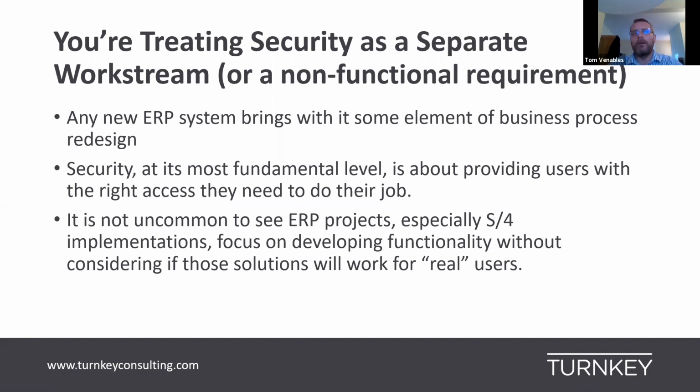And if you're not exposing those up front and not treating those security requirements or risk and control requirements as equal to the functional requirements, you're going to run the risk of not exposing those until later in the project, testing later, and this will be a common theme, which then impacts the design, and you have to go back and split business processes. If you expose those requirements alongside all the functional requirements and treat them as equal, you'll have a much better time of proving that your functionality works.